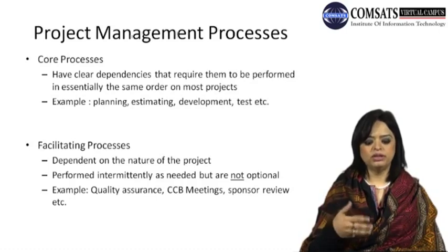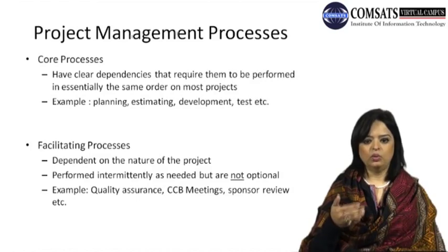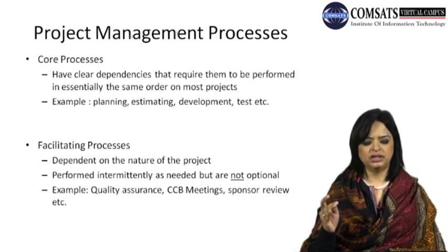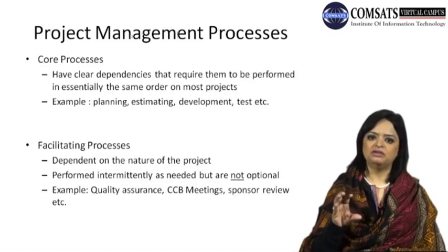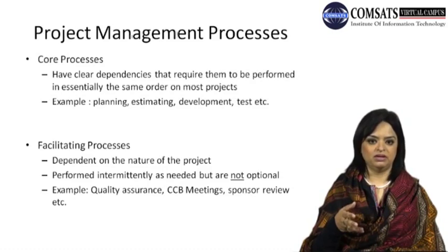Some examples will be the quality assurance process or the CCB meeting. The CCB meetings are the change control board meetings. Whenever there is a change and the change hits upon the constraints of meeting the time, the intended scope or the budget, then the sponsors and the high-level sponsors of the project organization and the customer organization need to sit down together and understand the benefit of it.